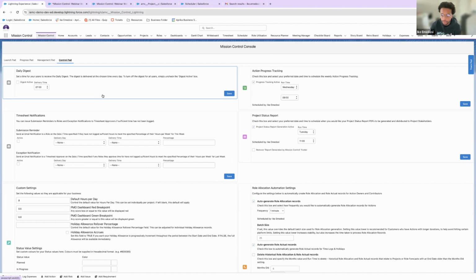Vincent, to answer your question, there are two free ways, and the one I'm showing right here is our daily digest. If you want to share a project with external partners who do not use Salesforce, you can utilize a daily digest. What you'll need to do is put their contact within Mission Control or Salesforce, so we know what email address to send this information to and which project to connect that contact to, and we'll spit out a daily digest.